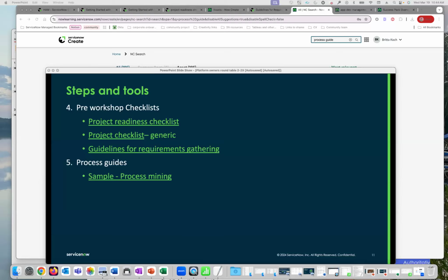A lot of times we will create a service catalog item with way fewer fields than they need, just as a version 1, and then we'll regroup in 30 days and see what requests you've had submitted with your form.